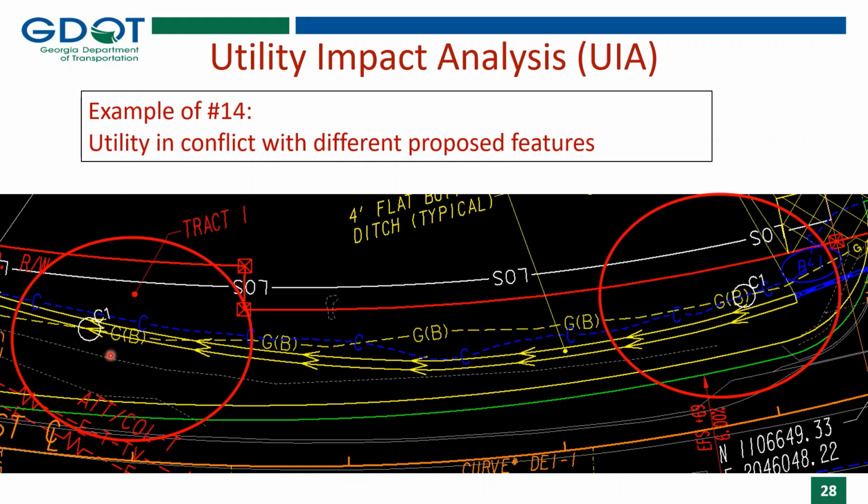You can use your engineering judgment, you could start it prior to this point, because in order to dig this ditch, you will have to go a little bit outside of these lines for that ditch, and it may cause a conflict before this point. And you see this conflict will start here, and we'll have a range that starts here and follows this conflict all the way over to here, and this is where that conflict will end.